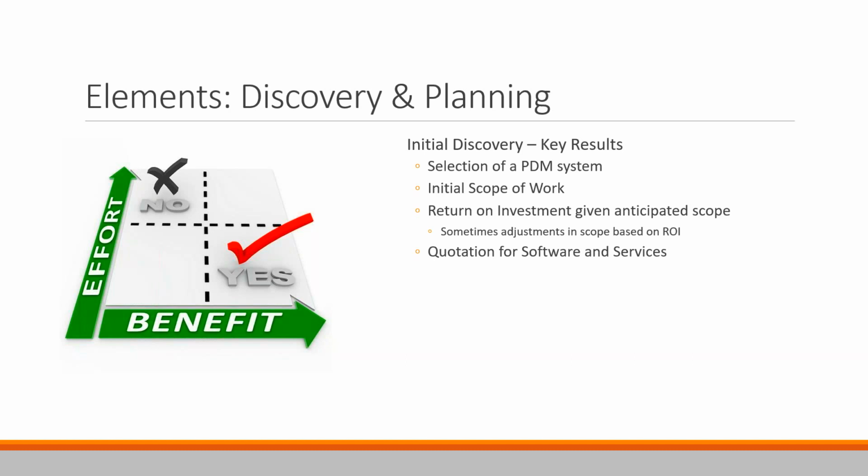Once you've determined the system and the implementation effort, then you can develop an ROI. What's it going to cost us in software, in services, in our own internal effort, and are we going to derive enough benefit from that investment of time and effort? And at Hagerman, we have some tools that can help determine ROI that really factor in just about everything, including the benefits of getting professional help in implementing one of these things. There are real quantitative benefits from a productivity standpoint for doing that as well.